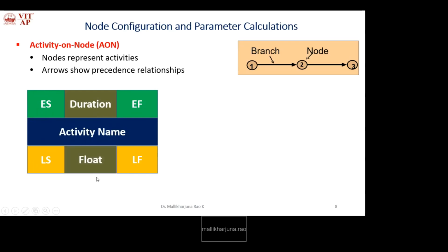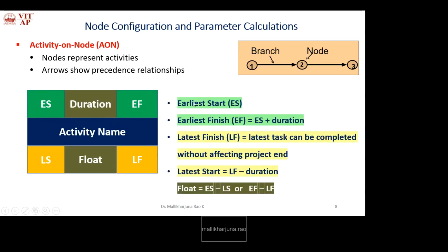And float. Float is nothing but the difference between either this combination or this combination: the difference between ES and LS, or EF and LF. We'll see that formula. Earliest start, that is for all the activities.